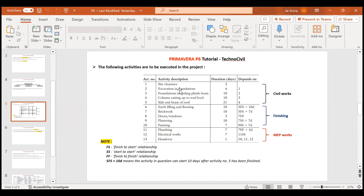Excavation in foundation can only be started once your site clearance has completed. That means this is a finish-to-start relationship. By default, every relationship is a finish-to-start relationship until stated otherwise. So your excavation will start only when your site clearance has finished. FS means the second activity starts (S) when the first activity finishes (F) — when the first activity finishes, then the second activity will start.